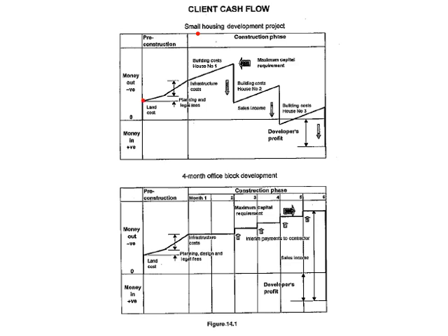then you've got your preparation of legal fees and so on, then you've got your design costs and so on. Then you actually appoint the contractor, so you have a constant outflow up to that point where you can actually sell that house, and then your deficit goes down, and then you just have your construction cost again, and it goes down again, and so it goes on. Okay, so in this range here is where the client actually gets his income.